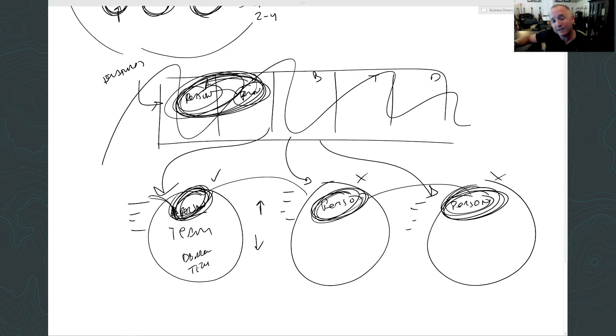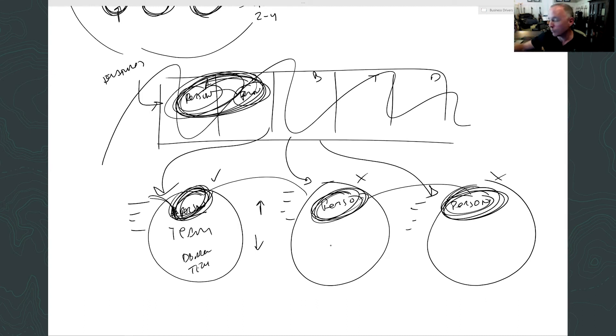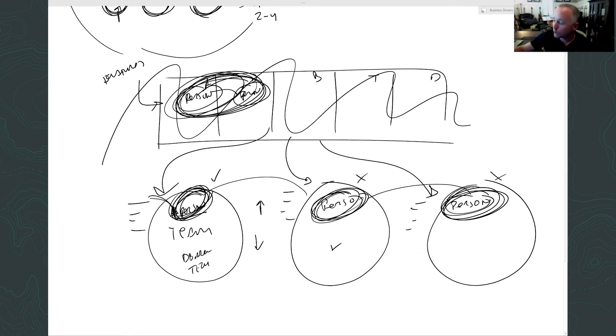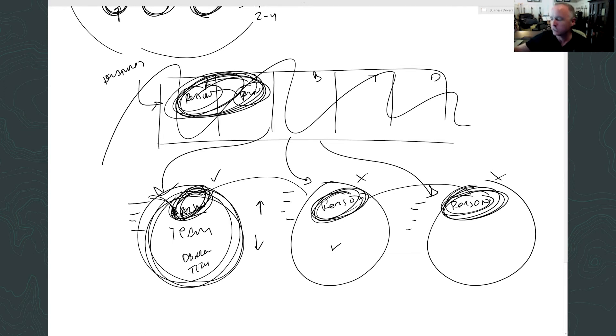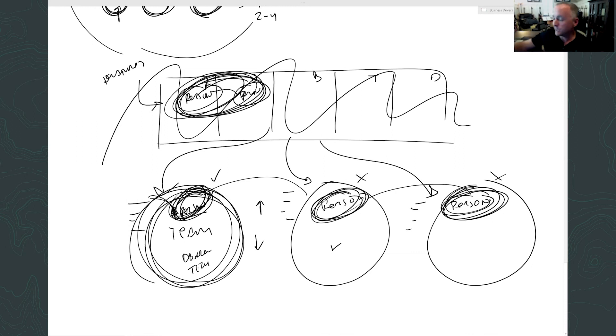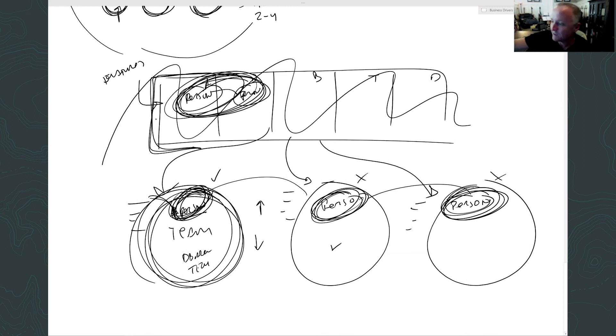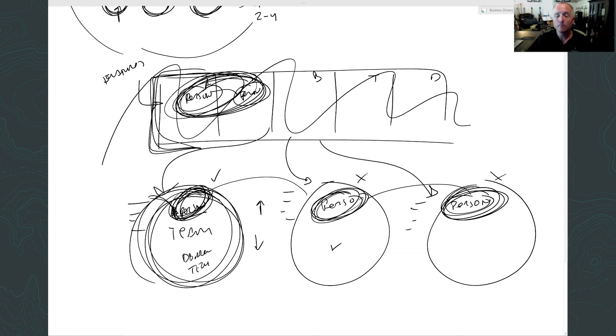That can be an incredibly volatile thing and you're likely to starve one of these teams from being able to get their work done. So look for opportunities for encapsulation first, and if you can't encapsulate, explicitly orchestrate. I like the idea of doing that with Kanban. But avoid the condition where you put unmanaged dependencies between teams.